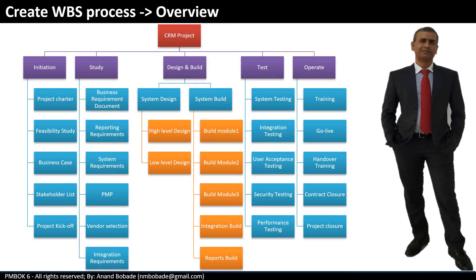The resulting WBS looks like an organization chart, with the top level being large components and the bottom level being the smallest work packages. These small components can be further divided into smaller ones. It's also equally important to understand what WBS is not. Please note it is not a flowchart — there is no sequence of activities or components. It doesn't show how the project will be executed, and it doesn't show relationships between two or more components or packages.